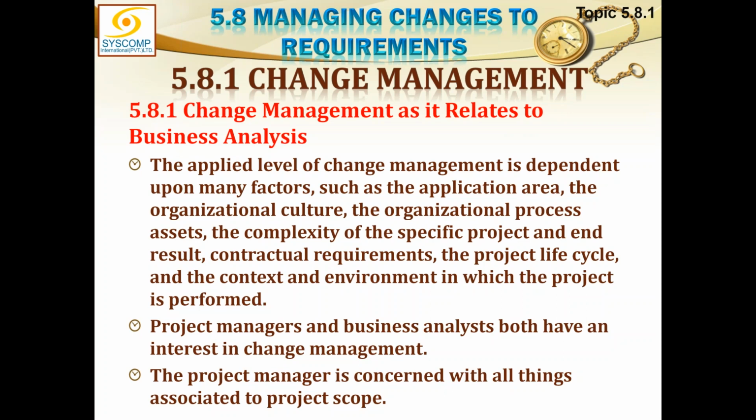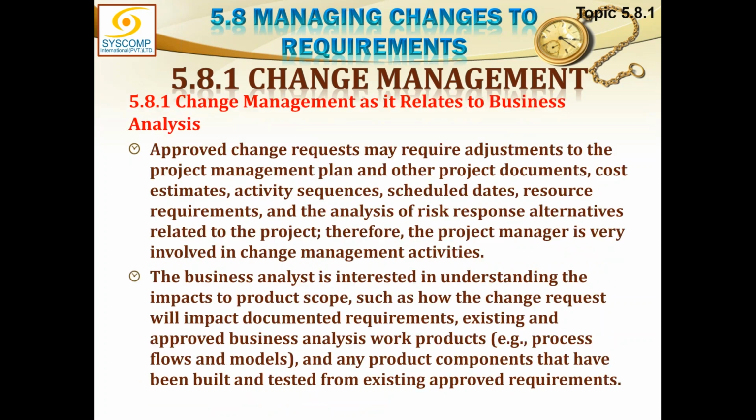Project managers and business analysts both have an interest in change management. The project manager is concerned with all changes associated to the project scope, and as we already understand, the product scope is actually the subject of the business analyst. Approved change requests may require adjustments to the project management plan and other project documents, cost estimates, activity sequences, schedule dates, resource requirements, and the analysis of risk response alternatives related to the project. Therefore, the project manager is very much involved in change management activities.